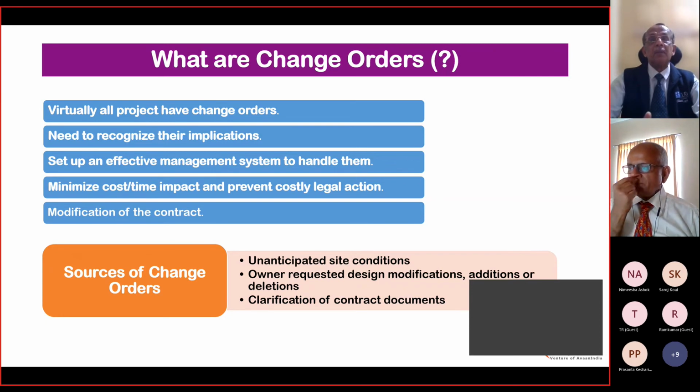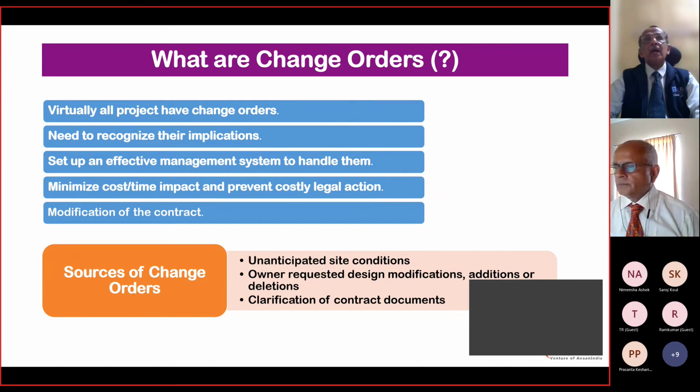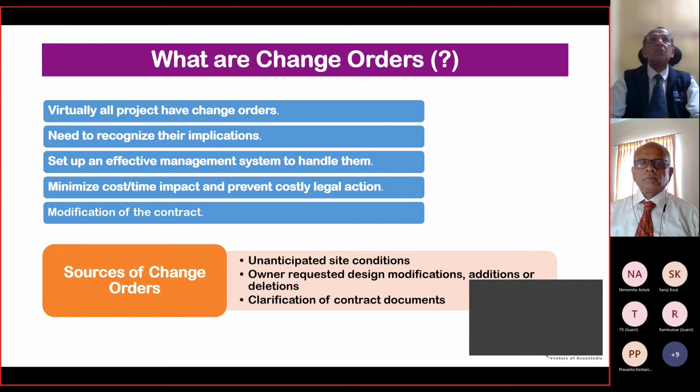For example, in the Gulf countries, especially Saudi, there are quite a number of local manufacturers out there. Since they are local manufacturers, the items imported on their behalf are customs duty exempted. When it is customs duty exempted, there are specific instructions in the purchase order, to start with, as to how the documentation has to be carried out. What are the documents and attachments which are required? What are the shipping marks? All kinds of nitty-gritty things are incorporated in the purchase order, and it has to be abided.